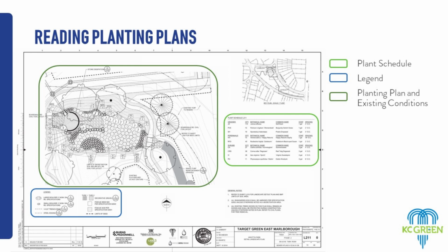And then also the plans typically have a little legend, and that will note some more of the hardscape elements, such as boulders, gravel, curbs, and edging on the plan. I think one thing to point out about these plans is that in most cases, it's been 3 years since these were installed, if not longer. And so while this may be how it was designed, it's very likely you may be out on site and you find that it's a completely different plant that's out there.